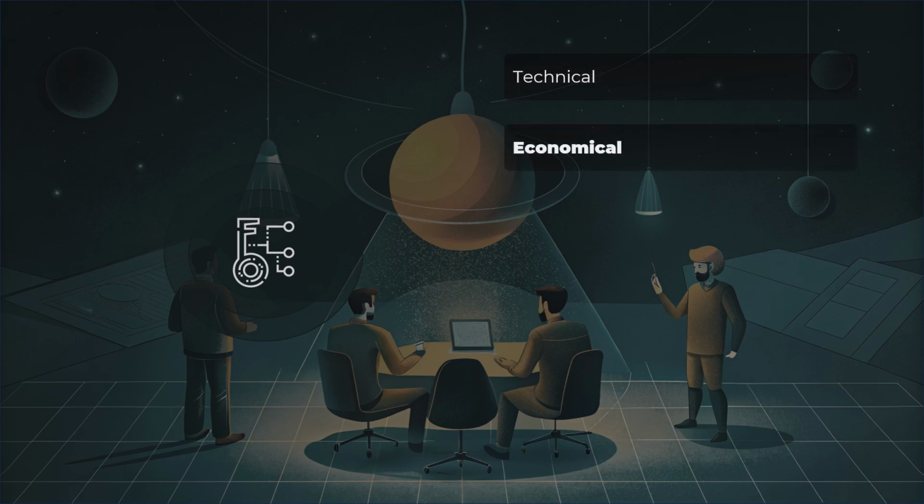Economic feasibility. Cost analysis. Estimate the costs associated with project development, including initial investment, operational expenses, and maintenance costs. Revenue projections. Forecast potential revenue streams and income generated by the project over its life cycle. Financial metrics. Calculate financial metrics such as ROI, NPV, IRR, and payback period to determine the project's financial viability. Market demand. Assess the market demand for the product or service and the potential for profitability.